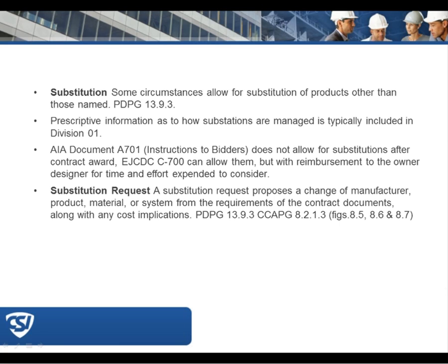And on private projects, most of them are CM projects, and in those situations, especially when it's a fast-moving project, we will allow substitutions as we move along, because we may only, at the time we're developing the documents, be looking at one product as our basis of design and not even be looking at equals or equivalents or substitutions. So it's common for me in the private work to get substitution requests. It's not as common in the public work.